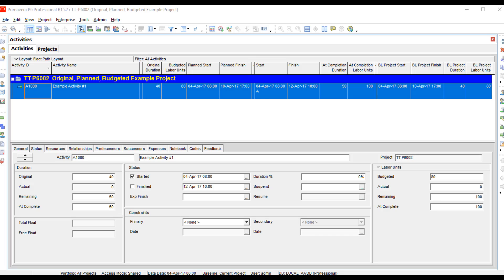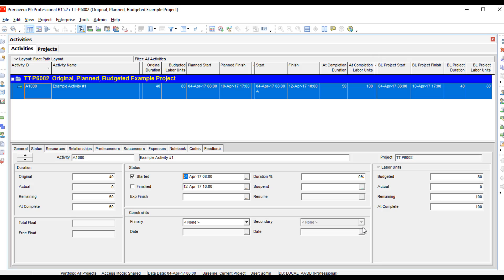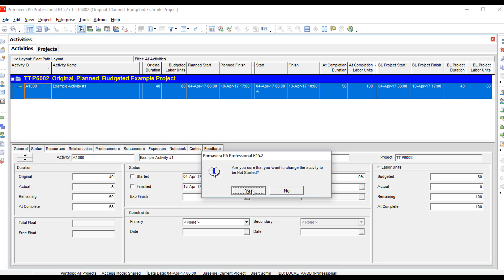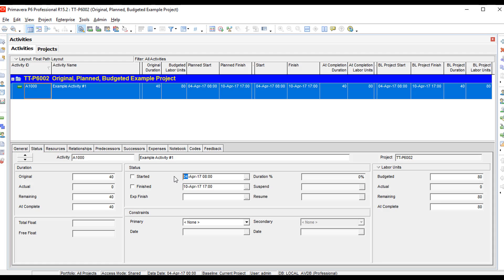After creating a baseline, what we want to look at are the third set of fields. To add clarity around the dates, I'll change my actual start to the 5th of April — notice that the plan start did not change. If the activity was not started, I could change the plan start, and the scheduled start and finish would adjust accordingly. But notice that the plan start followed the start I had put in when the activity wasn't started yet.